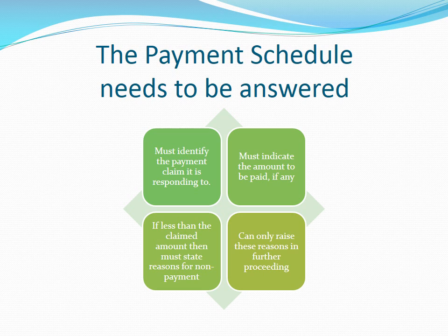Must identify the payment claim it is responding to, must indicate the amount to be paid, if any. If less than the amount claimed, then must state the reasons for payment and can only raise those reasons in future proceedings, except in Victoria.